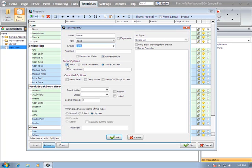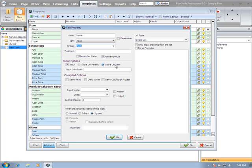The input options - this is where you'll select to make it an input item. Store on parent or store on item. Most cases, your option will be store on item. However, if you're going to store a value on a parent item such as an assembly or a digitizer, you can store the value - something like a wall height that is used by several other child items. That way you're only setting that item value one time and populating all the rest.